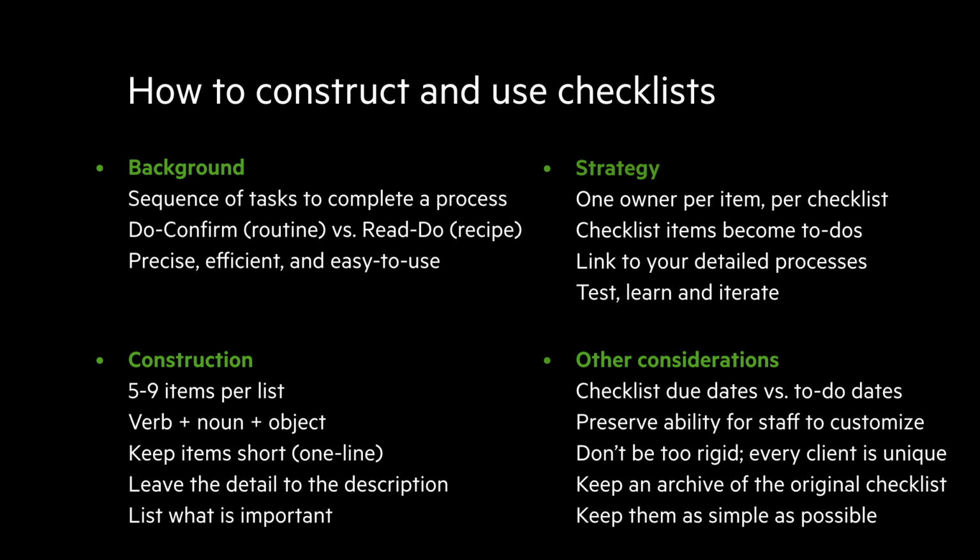The problem that comes with a checklist that's super long is the inability to be able to complete the checklist, and the fact that when you're looking at it at a glance, if there's 100 steps and you've gotten through 8 of it, then your progress meter is showing like 8%. And you don't necessarily, when looking at it from an owner or a manager's perspective, understand how far someone's really gone, because those step progressions are so small because there's just such a large count.